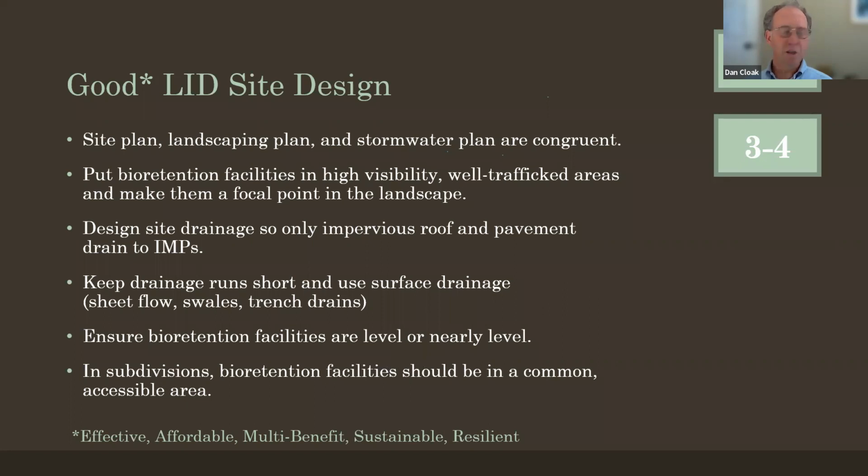The engineer finds out it has to be flat, and you have the problem that now you need a wall on the upstream side, on the upgradient side, maybe on the downgradient side too, in order to build it level, and that adds to the cost. It has aesthetic consequences, and is a problem. So we want that included in this process of integrating the design team.